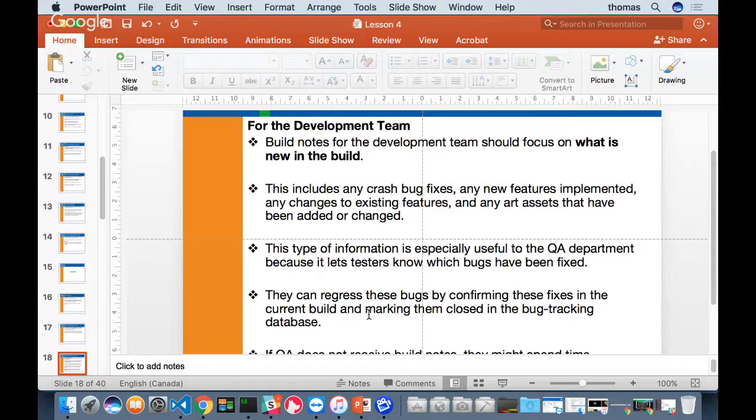So let's say, for example, we come to an iteration at the end of a release. For this iteration, this build, as an example, we have a bunch of notes that came from QA saying, we found 2 bugs in our last release. We have to do another iteration, another build to fix those bugs. And you're not going to just do an iteration for bugs. I mean, you could. You want to make an iteration for adding more features. So you can do both: kill the bugs and add new features.